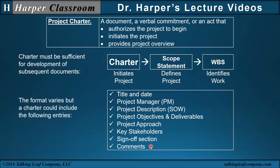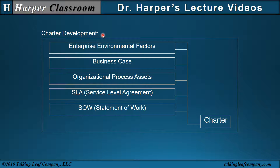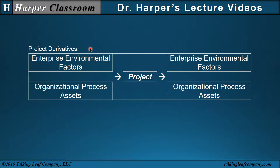Items not necessarily part of the Charter but related to the project include Charter development inputs: enterprise environmental factors (environmental constraints or regulations requiring compliance); business case (identifying the project's contribution to the organization); organizational process assets (internal assets that help support, direct, or define the project execution); SLA or service level agreement (which could identify project requirements); and SOW or statement of work (describing the details of deliverables). Some or all of these could be part of the Charter. Importantly, even though enterprise environmental factors and organizational process assets are inputs to a project, a project output should enhance and contribute back to those factors and assets.